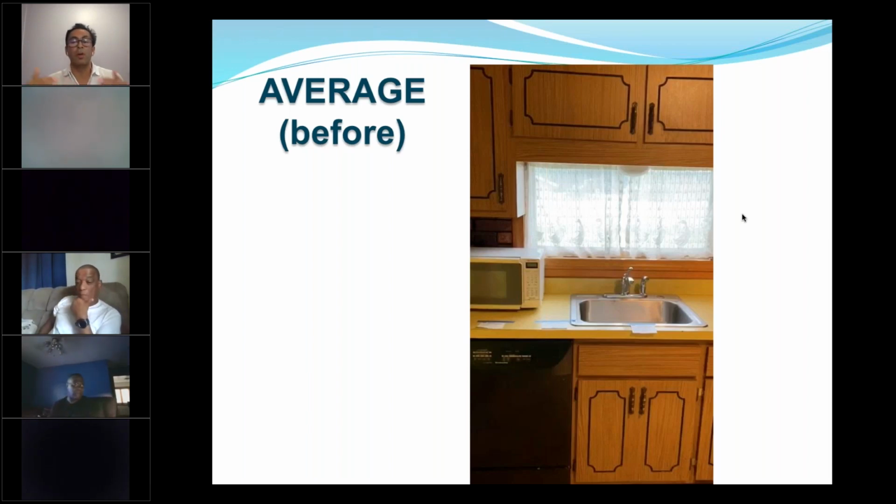Awesome, 45,000. So if I was to do the scope of work with the bank on this one, we needed to account for at least 45,000, adding a 10,000 cushion. So in this case, it ended up being $34,000 because we did not have any unexpected items. The property, as you saw, was in pretty good condition. So the table that I showed you was right on target. We did not need to use the $10,000 cushion. So it ended up being 34,000, which is right on the spot. Based on that chart, it said 35,000. It ended up being 34,000, but it's also an incredible great idea to have that 10,000 cushion.